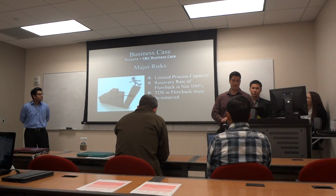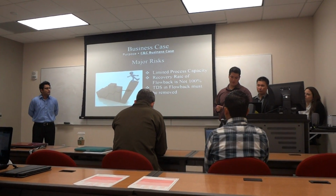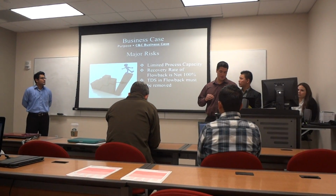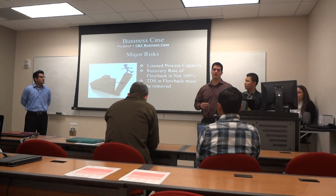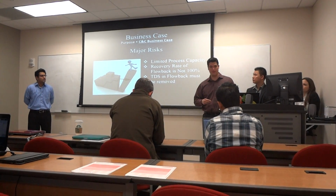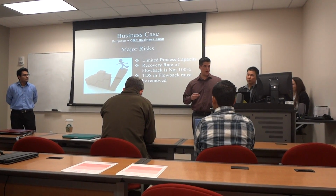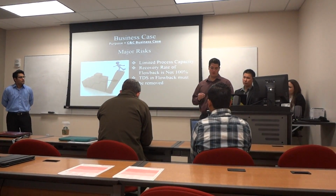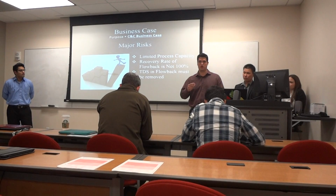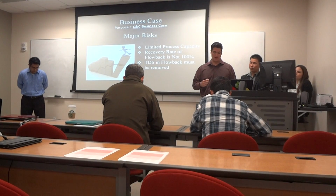Also, some of the major risks that we listed within our business case included the possibility that Fountain Quell's rover technology may not be able to process all the flowback we need in the time we need it, and this could cause delays in the treated flowback available for reuse. Also, another risk is that not 100% of the flowback will be recovered. This will also result in less treated flowback available for reuse.